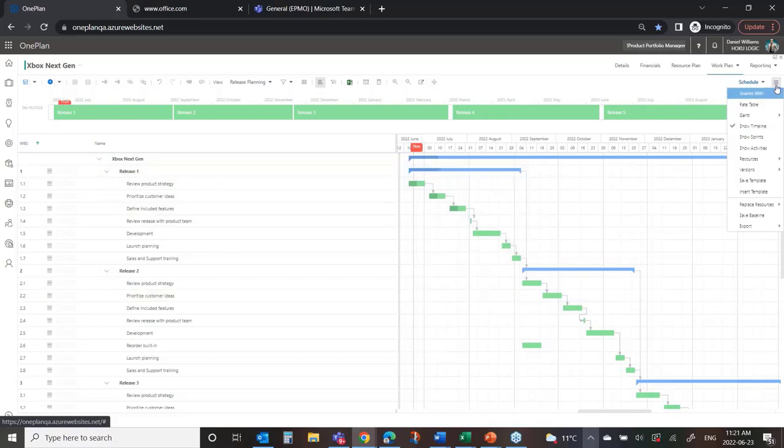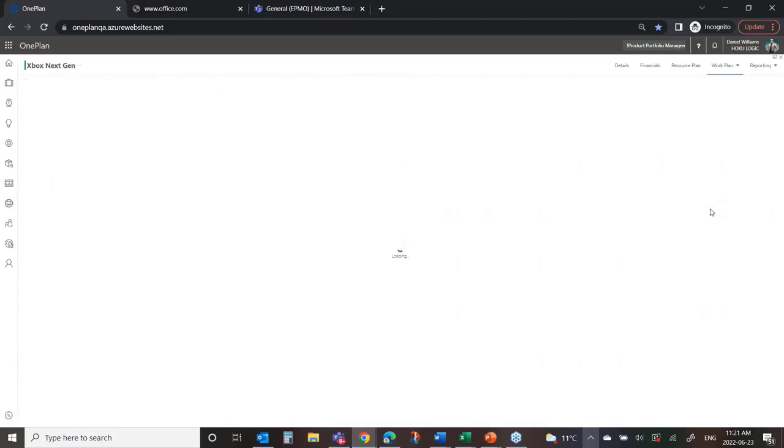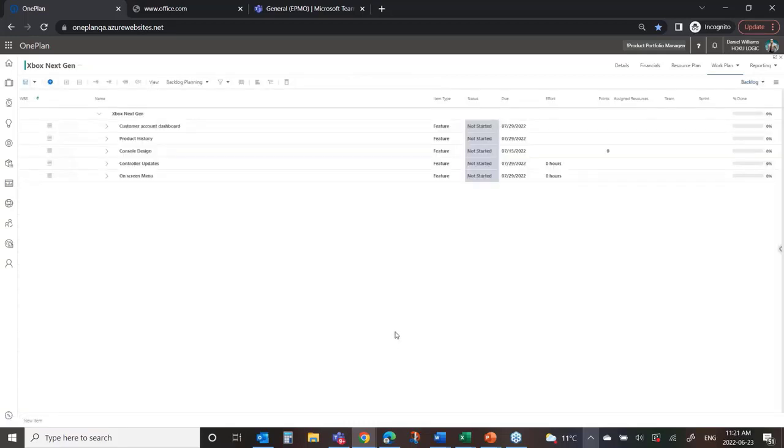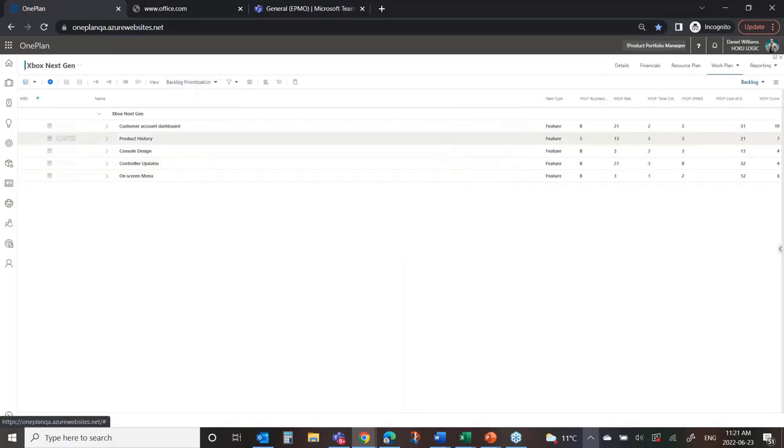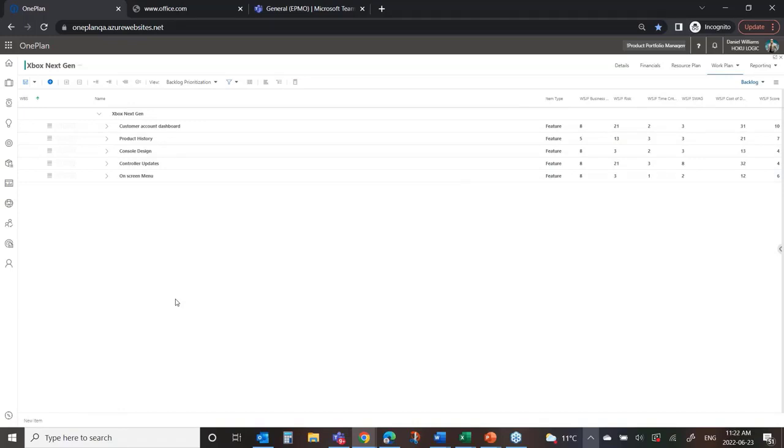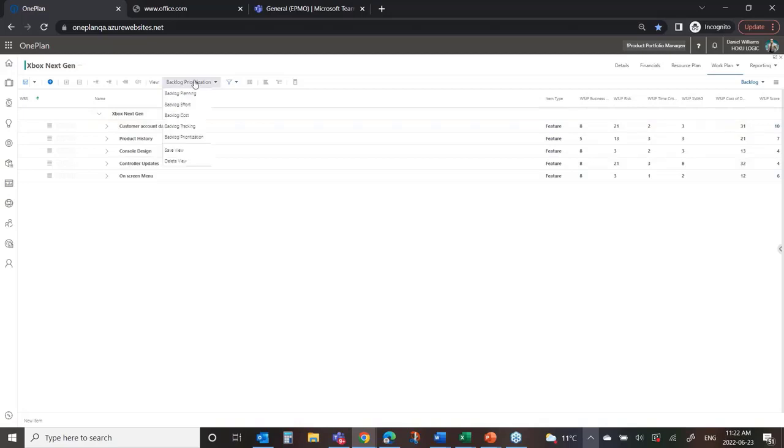Now if I switch over to my backlog view, now I'm going to go a layer deeper. And I'm going to look at my feature list, and where we're going to put the various components and things that we need to build. Here I can see we've prioritized the features themselves. So we've done some analysis of the various features that we want to deploy. And we've used weighted shortest job first prioritization to understand that the customer account dashboard is our highest priority feature set that we need to work on. And on down, you can see the different features and how they rank. So that's important information for us as we're making our planning decisions to understand the priority of the various features and where we should invest our time and how we should line them up to the release.